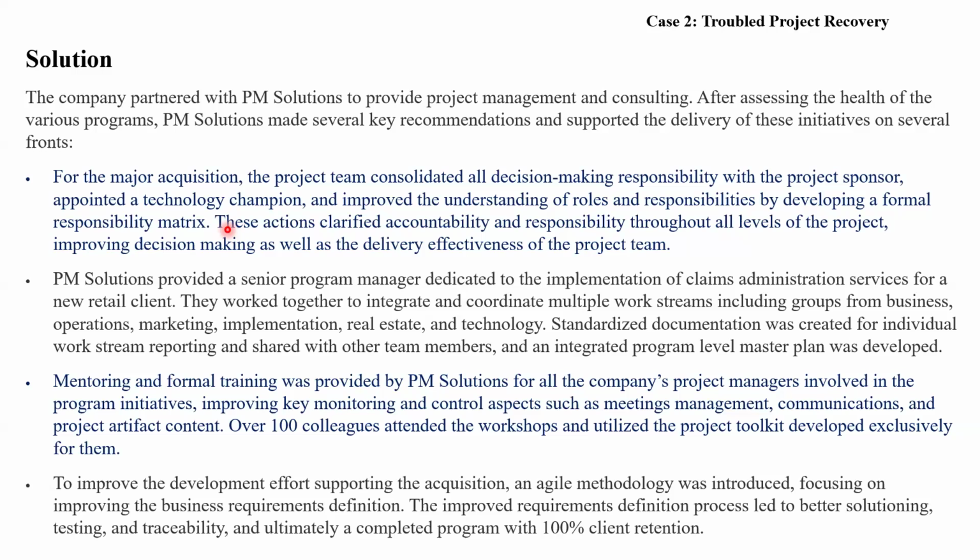So the RACI matrix, if you can remember that, I don't know whether I discussed it in my session, or maybe Dr. Madhu might have discussed it with you. The RACI matrix discusses who is responsible, who is accountable, and who should be consulted with regard to different activities, right? Everything related to the human resource management aspect is discussed under this responsibility matrix. So developing that is very important.